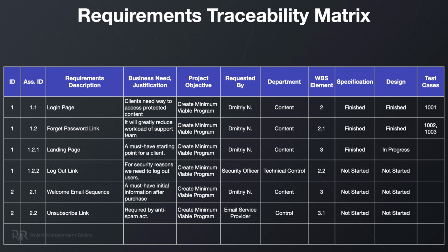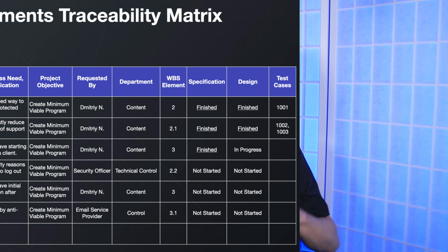It will help you eliminate or scale down requirements to the required level of the business needs. It will also help you to build a case not to include some change requests further down the road if you cannot match them to a business objective. And later, you also want to connect requirements with deliverables, because you want to know in what tangible and verifiable piece of the project you can test a given requirement or a feature. What's even more important, you want to ensure that you don't forget to capture some work you need to perform to implement a specific piece of requirement.